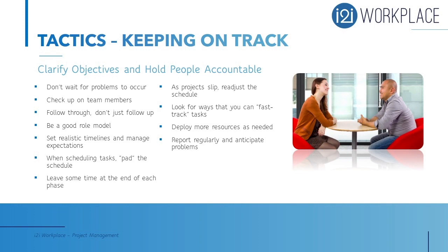And as projects slip, readjust the schedule if you can. Look for ways that you can fast-track tasks by bringing in additional resources or taking a shortcut if appropriate. And report regularly and anticipate problems. If you follow these steps, your project should stay on track.